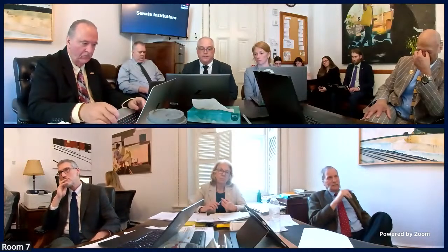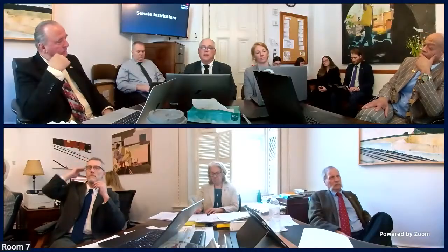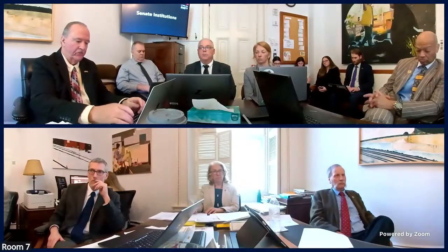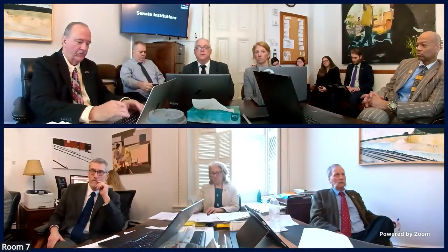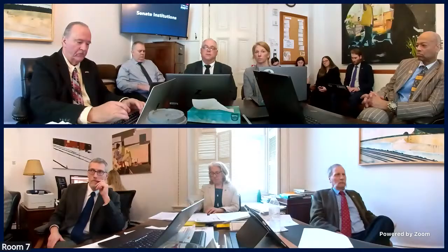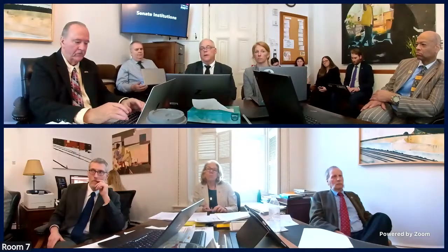That has been worked out. Senator, as you know, in the engineering world, once you get direction, it can turn around quickly. We have finally figured out how we can fit our drainage ponds, stormwater ponds on site and not impact our heat plant. They had to be moved, but not a lot. Now we're full steam ahead to get our permit in place for our stormwater. We are hoping that will go well and that we could start relocating those ponds this fall, so that in the spring we should be able to start our foundation work.